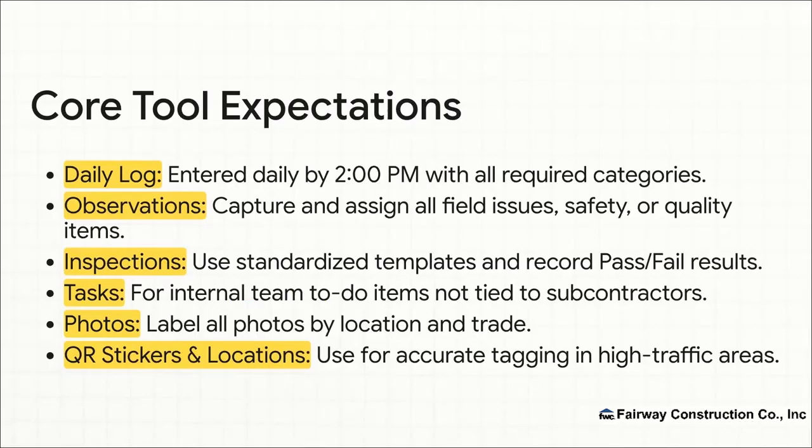These 6 tools right here, these are your daily drivers. And the expectation is super simple. Use them consistently, and use them correctly. Daily logs are done by 2 p.m. Every issue you see goes into observations. All our inspections use the same templates. It's all designed to be clear and keep things moving.